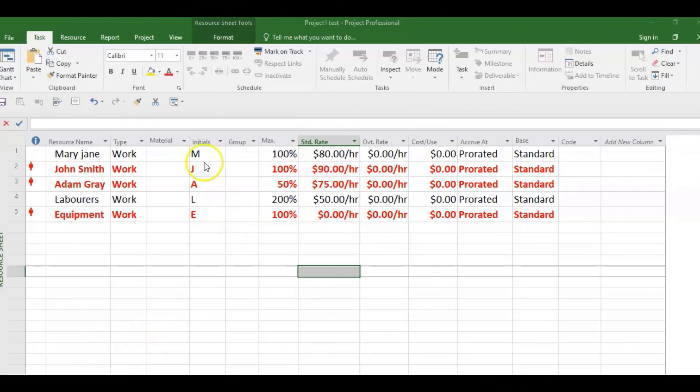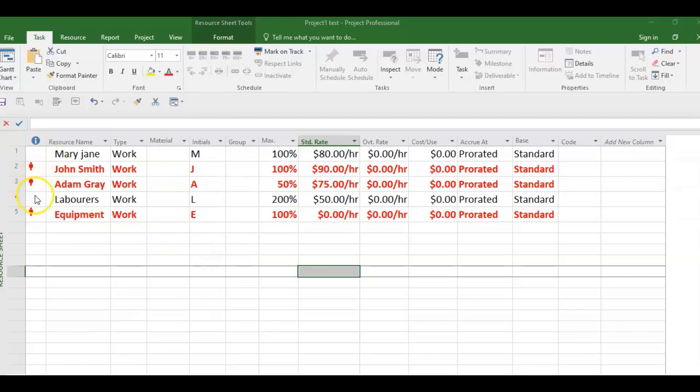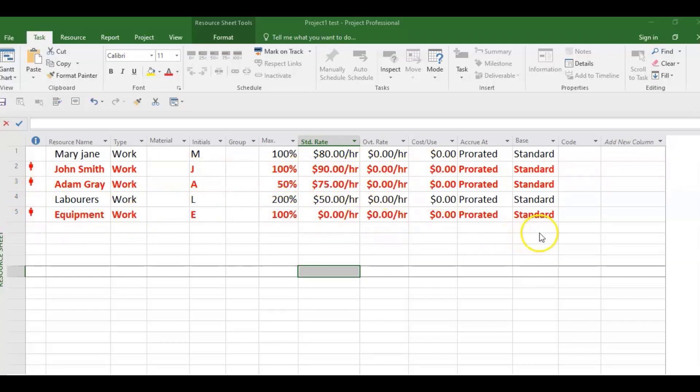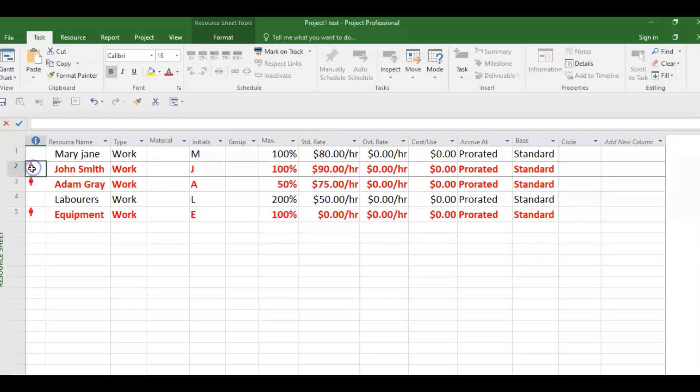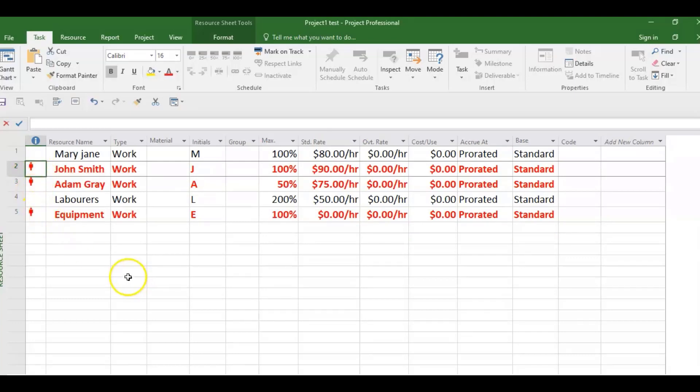So we are in the resource sheet view of MS Project and we could quickly spot the over-allocated resources. John Smith, Adam Gray, and Equipment—they are all in red and that is one way of identifying that they are over-allocated. If you check the indicator column and you just click here, you will see 'these resources over-allocated.' So let's go to another view because we need to investigate.